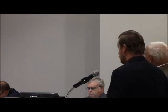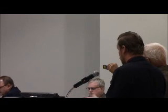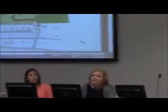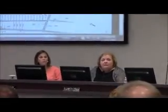Is there any concern about security having so many construction employees on the school grounds at the same time students are there? That's more of a parent question. Yeah, the fence will separate construction from students. Every contractor on site is mandated to have the appropriate clearances, just as any school employee, and that's another task of our owner's representative. He will maintain and warehouse and make sure that everyone has those appropriate clearances.